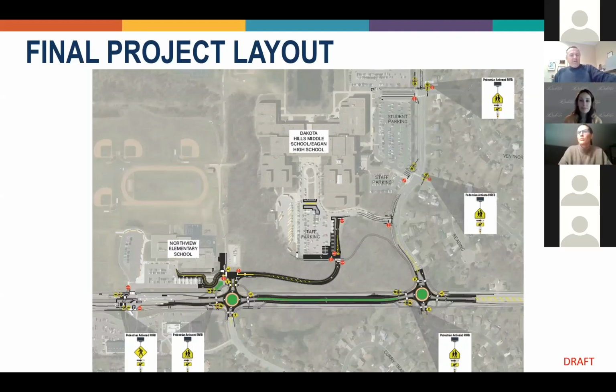So the bidding process that the public agencies use, we do put detailed construction plans and specifications together that are essentially the performance requirements for the bidders. And depending on how a contractor approaches the project, they may have access to different materials. They may have just a different way of approaching it. We give them some flexibility to get creative and how to do it efficiently.